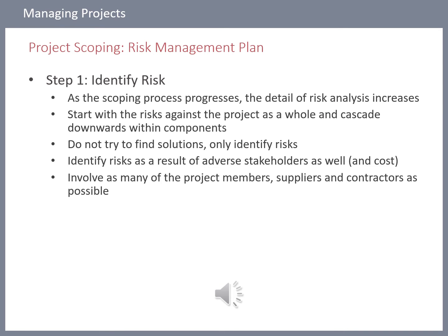When it comes to identifying the risk, this is the first step in the process, we need to be creative in the process of doing so. So the PMI talks about brainstorming, about information sessions, about getting the community ready, or mobilizing the community. Maybe talk to some professionals or look at other information that you have from old projects. And the key really here is not to find solutions to the risk, but to identify them.